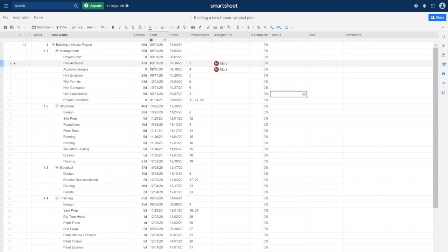So when I was giving an example of us finishing this early, it's not actually started, but if the project was started and you finished it early, you decrease the duration so that the finish date aligns with today's date, and everything below it that is linked to it through logic will also update. So nothing started. We're going to go ahead and drag that all the way down.